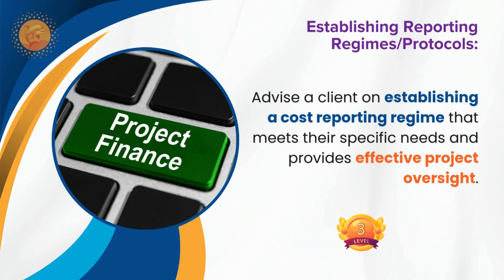Because the change management process will let them know about the additional costs, or the negative costs actually, and the cost report in total can give them the full picture of the project, and the cash flow can let them know the requirements of funds according to the project flow.